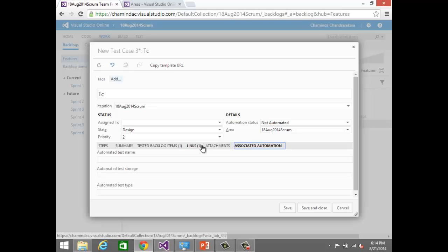So what we should do is we should talk about the bug only, but when we take that bug into consideration, we should always have a link to that particular user story to identify this is something related to this. That is why the relationship of bug and user story is always related. Now it can be like this. Now if you are having a CMMI kind of template, there is something called the change request, because in that practice we call it a change request.